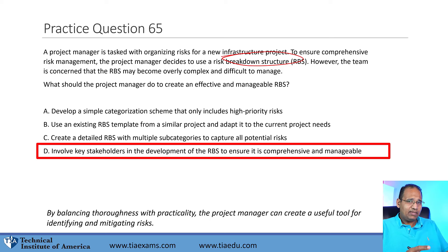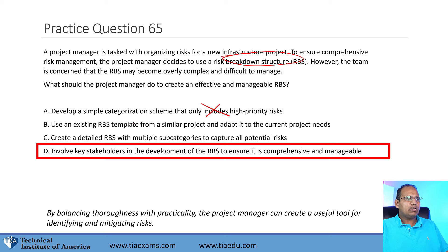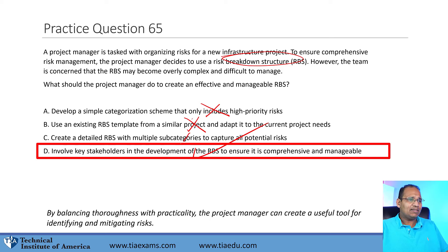Remember what an RBS does — it categorizes risks; the actual risks live in the risk register. Option A limits it to high-priority only, which is too narrow. Option B reuses an existing template, but every project is unique. Option C goes into detail, but the best approach is D — involve key stakeholders. The more people involved, including team members and subject matter experts, the more likely you'll build a comprehensive and manageable RBS.